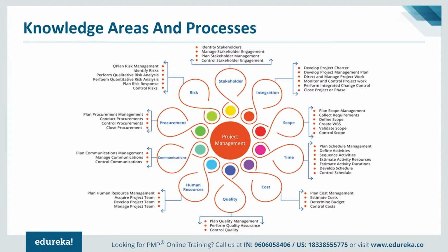Communication management plan will talk about, of course, creating the plan in itself: what to communicate, when to communicate, whom to communicate to, and what's the media to communicate. So is it going to be a meeting? Is it going to be an email? Is it going to be a push or pull communication? So what are the communication channels that we're going to use? So all this data will be captured there. Once we have the plan in place, then we need to manage and control it effectively.